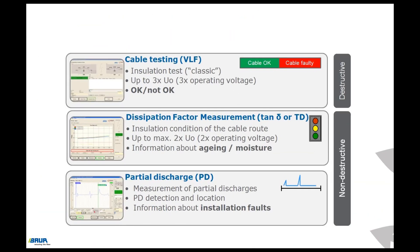To summarize all measurement methods and their most important functions: VLF cable testing provides information about whether the cable is okay and is used during commissioning of new or repaired cables for voltages up to 3×U0 — it is increasingly being replaced by the monitored withstand test. The TAN-delta measurement diagnoses the condition of the cable in terms of aging and moisture. PD testing locates partial discharges, uncovers installation faults, and provides initial information about the type of fault.